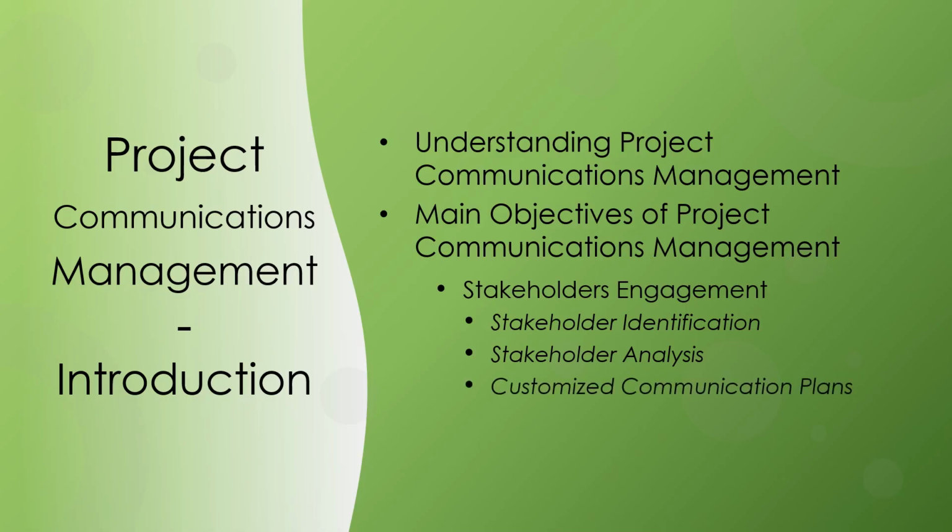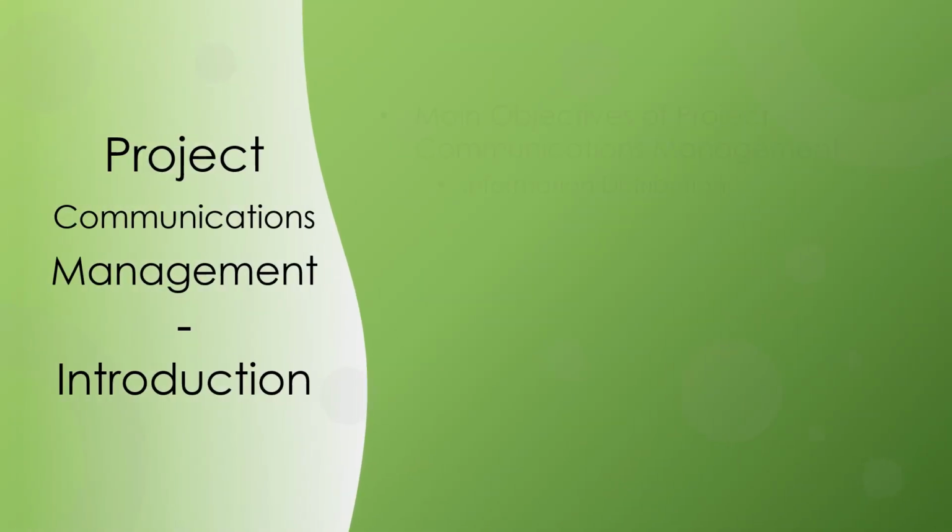Based on the analysis, project managers develop customized communication plans for each stakeholder group. These plans outline what information needs to be communicated, the preferred communication channels, and the frequency of communication. Information distribution.